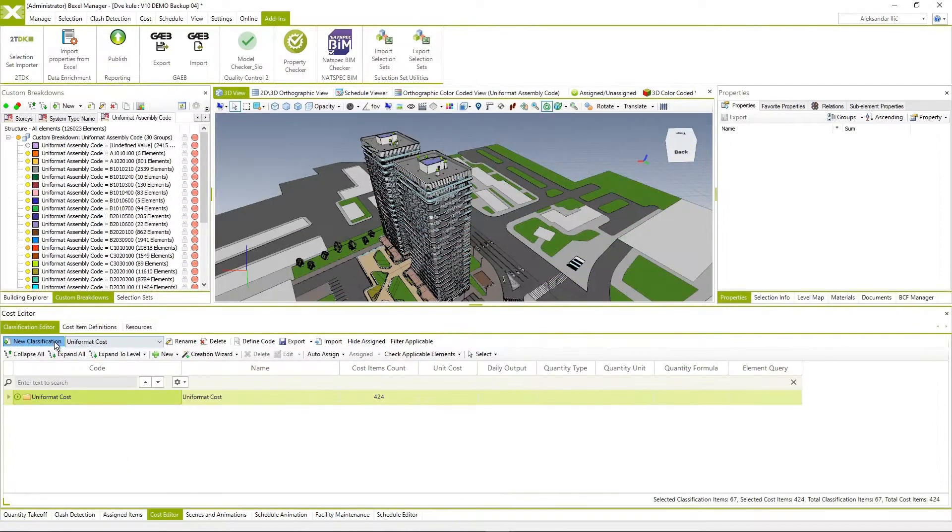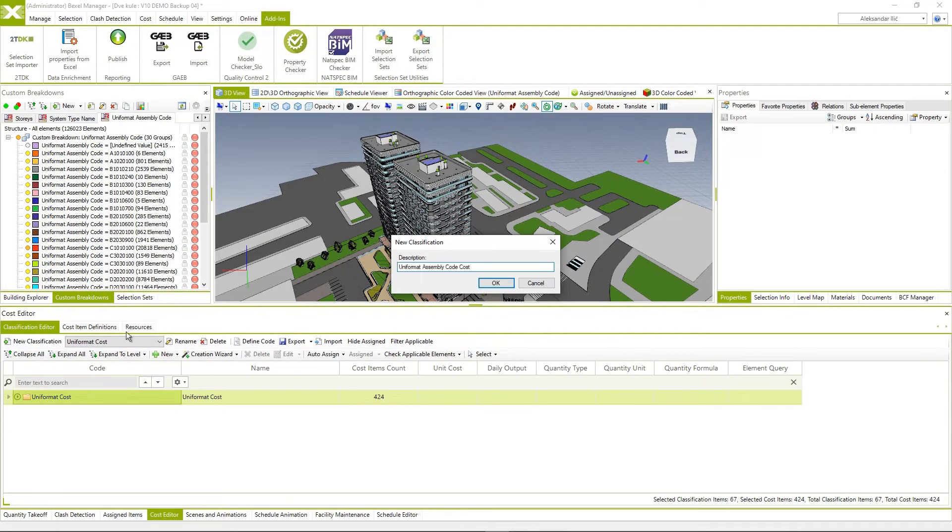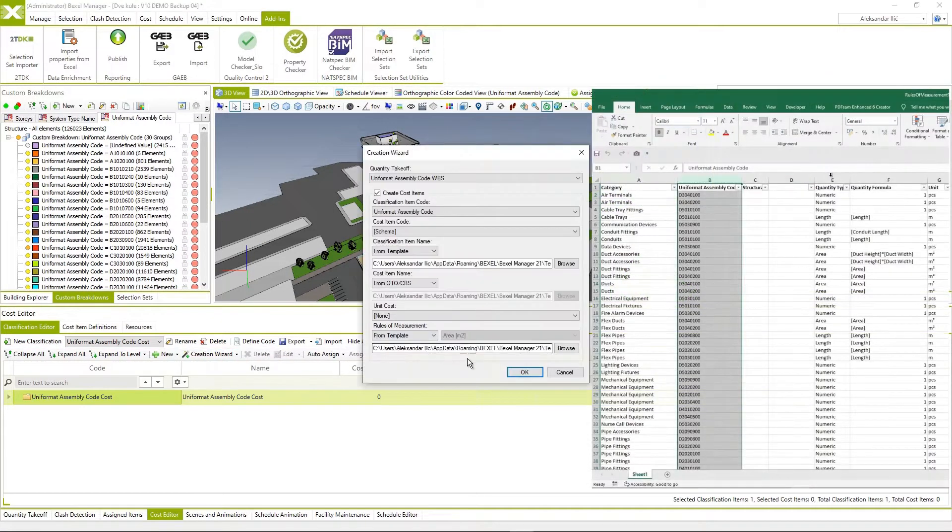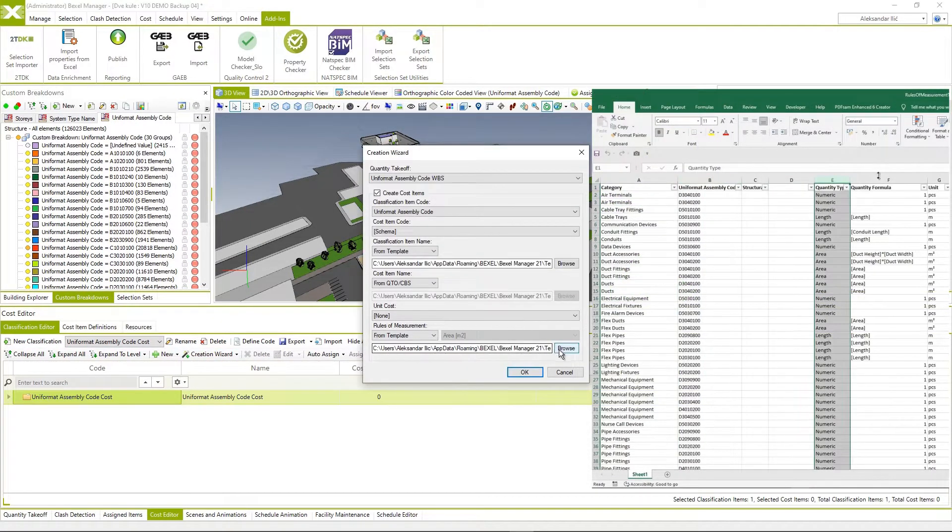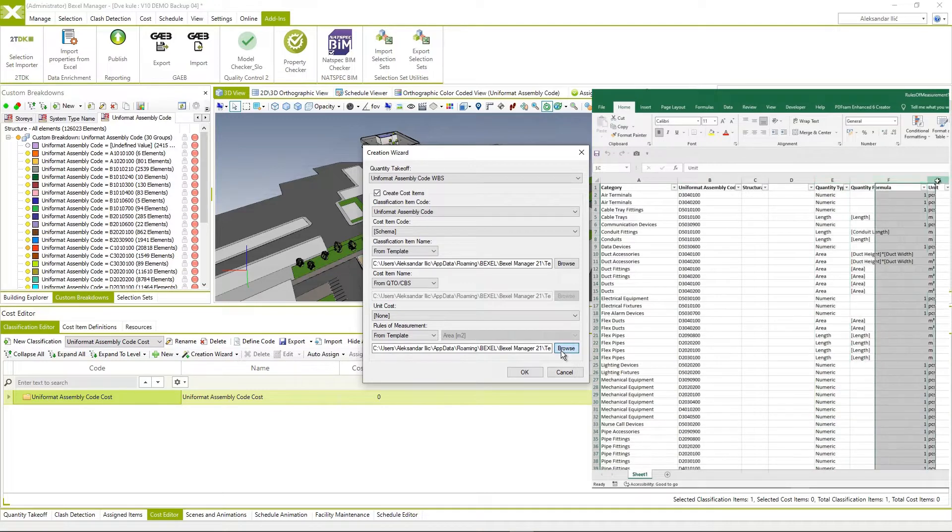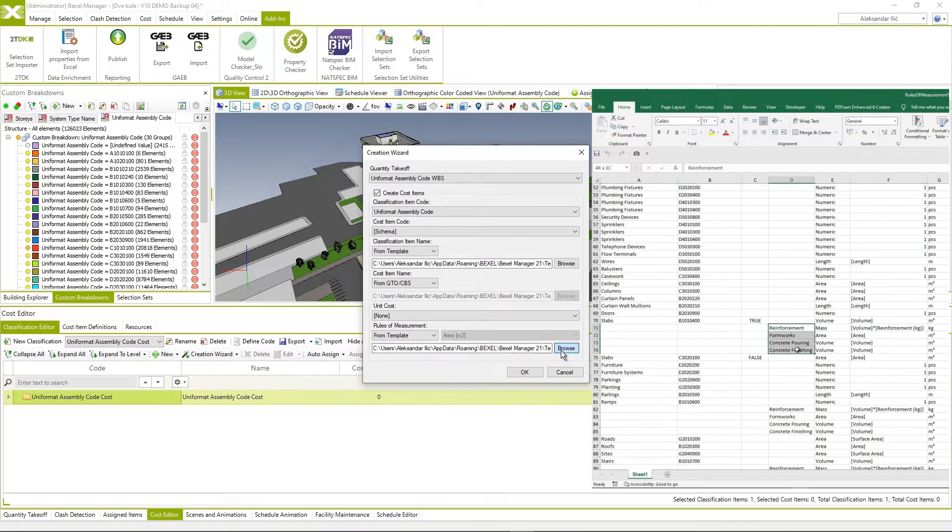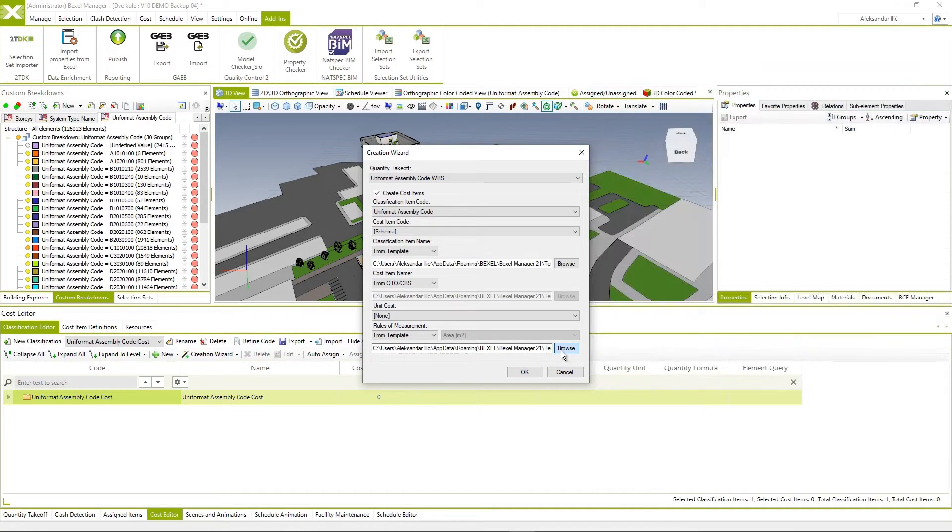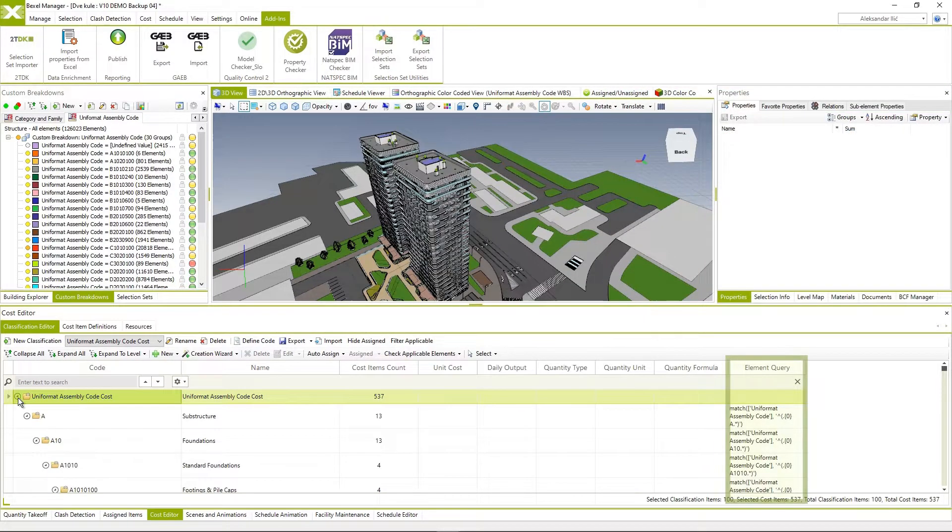Automatically generate cost classification with defined element queries using created quantity takeoff. Use rules of measurement template to automatically enrich BIM cost classification with quantity type, formula and unit.